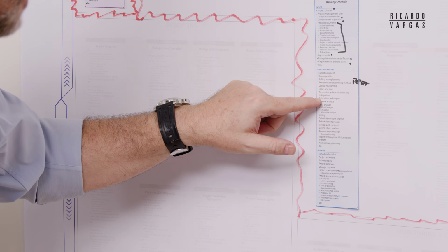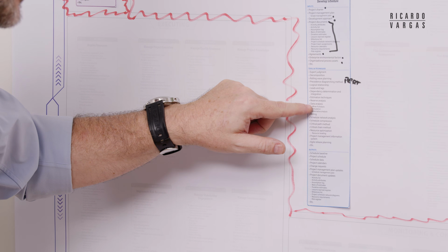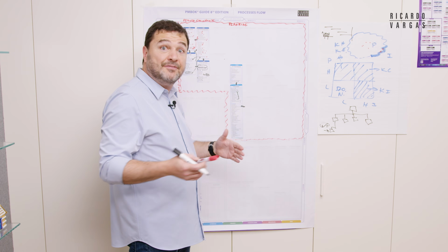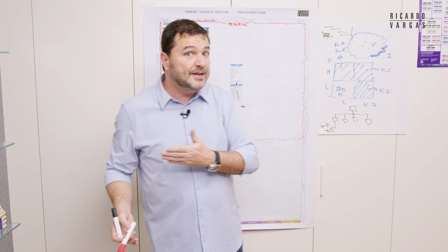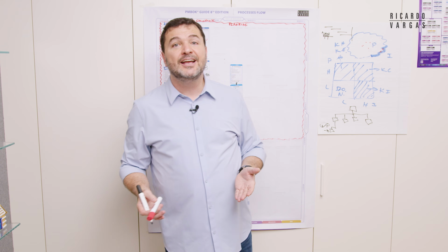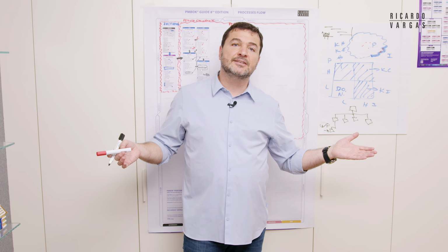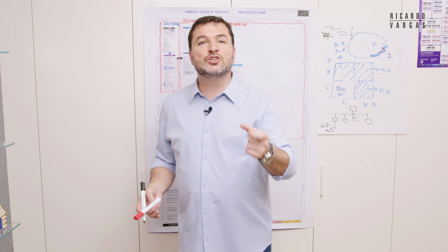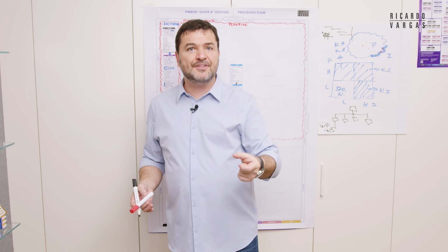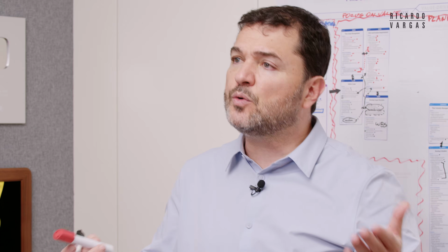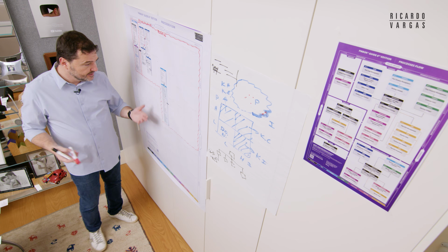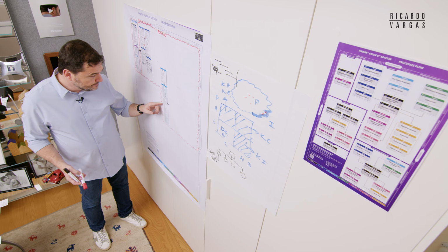Then, after that, estimating techniques. So you need to use estimating. As I mentioned 2 minutes ago, parametric modeling is a perfect example of that. So for example, you calculate the time per square meter of something, and then you multiply that, in this case the time, times the size of the room. And then you calculate the time you need for that. This is one example. Okay?